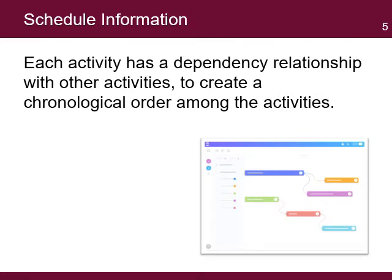All activities in the WBS need to have an estimate of the time it will take to complete them. This estimate becomes part of the project schedule, which is the total time to complete the project. Each activity identified in the WBS will have an estimated start and end date. Each activity will also have a dependency relationship with other activities to create a chronological order among the activities.